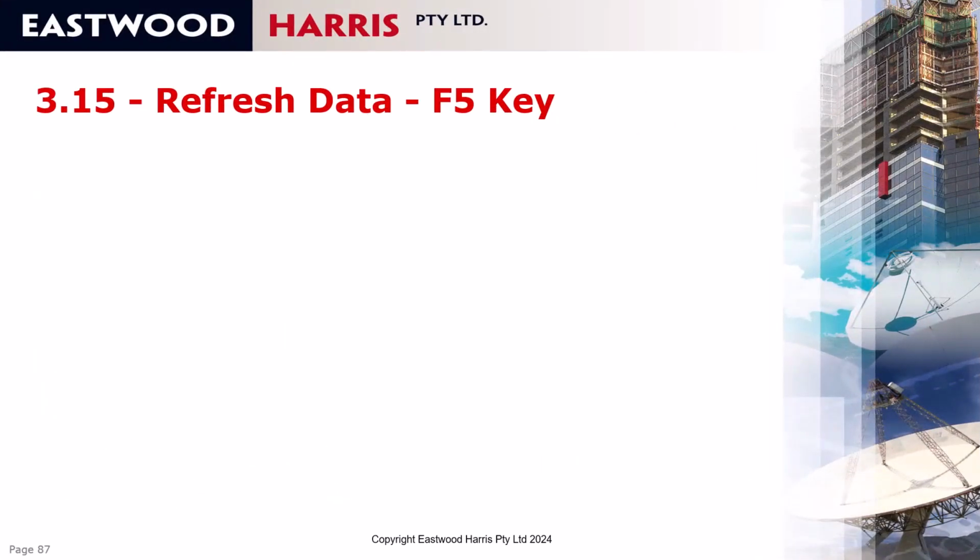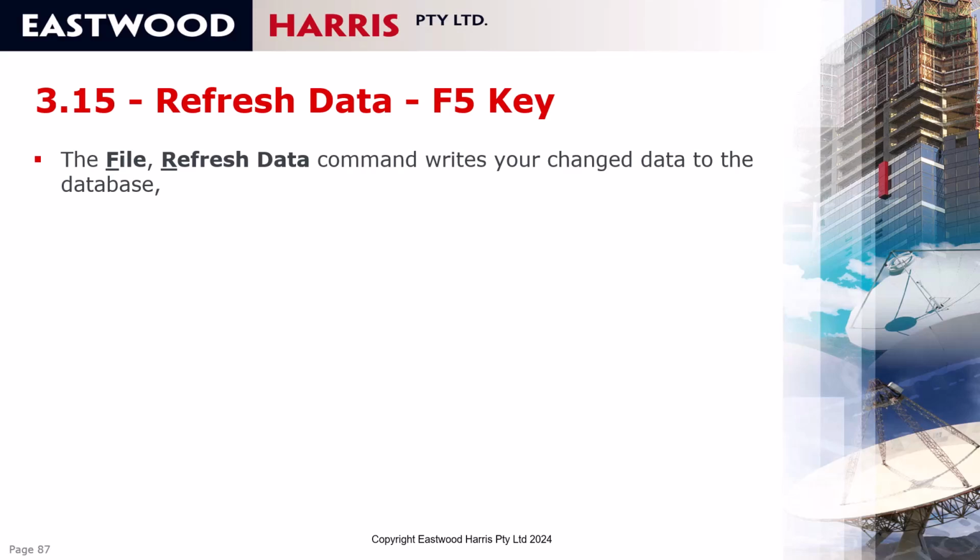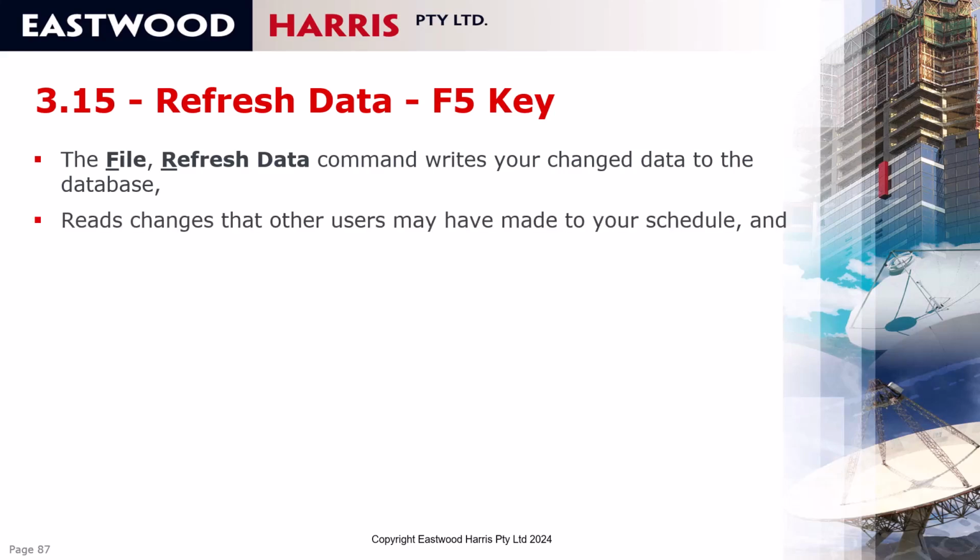Refresh data key. This is a very useful key. When multiple people have a project open and you are editing, other people won't see your changes unless you press the F5 key, which writes your change data to the database and also reads changes that other users may have made to your schedule. So both users will have to press the key twice.